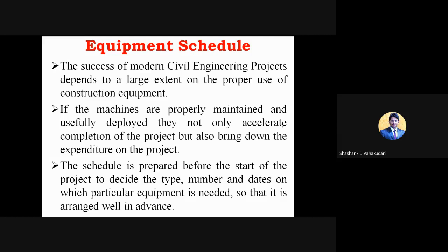So you need to determine first which type of equipment is required, how many, for how many days, and on which date it is required. Each and everything will be already known, so that we can arrange well in advance.